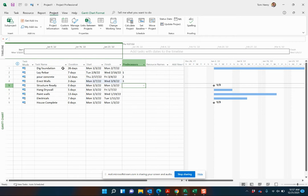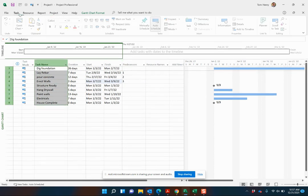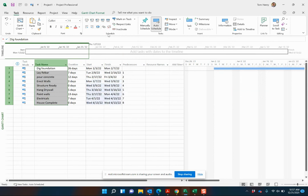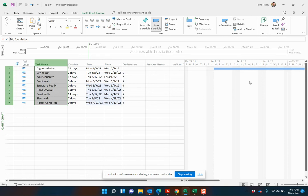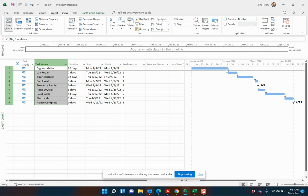So you can come in and do this, or you can just come in at the top, scroll all the way down. And if they are all to be linked in series like so, you can see we can do that. You see that the Gantt chart is kind of pushed out now. Quick tip here, click view, entire project, and we can see how it's looking on the Gantt chart.